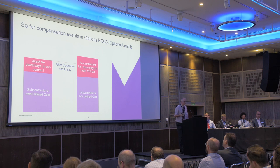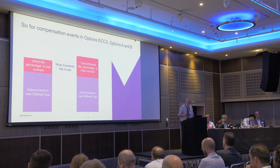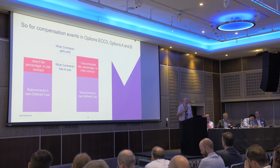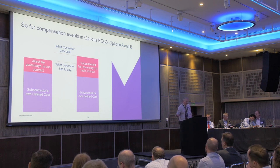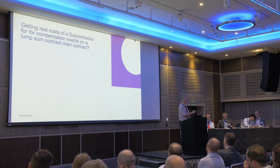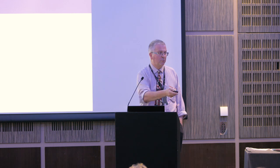So in options A and B, we use the shorter schedule of cost components for subcontractors, and most of that's real cost — hence the question: do you know how much the subcontractor pays his joiner? Do you really care? Probably not. From a contractor's perspective, you're going to have to pay out the subcontractor's defined cost in the subcontract plus the direct fee percentage, and get paid the same subcontract defined cost plus your subcontract fee percentage. But does the contract ever require you to show the project manager the subcontractor's real cost of his people? Lots of heads being shaken.